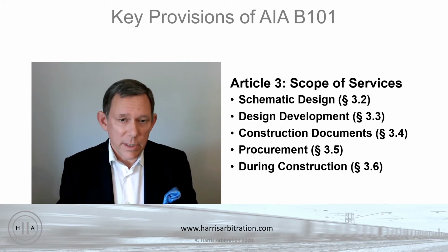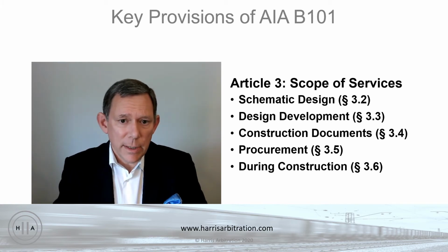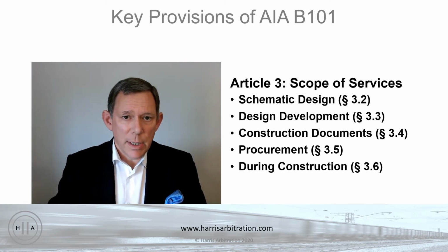And so it's easier in this project delivery method to compare apples to apples, because all of the contractors are looking at the same construction documents, they're bidding on the same things. And so the architect typically, because the architect usually has more experience in construction than the owner does, will assist with that process, getting the bid packages ready to go out to contractors, answering questions, sort of generally administering the bidding process.